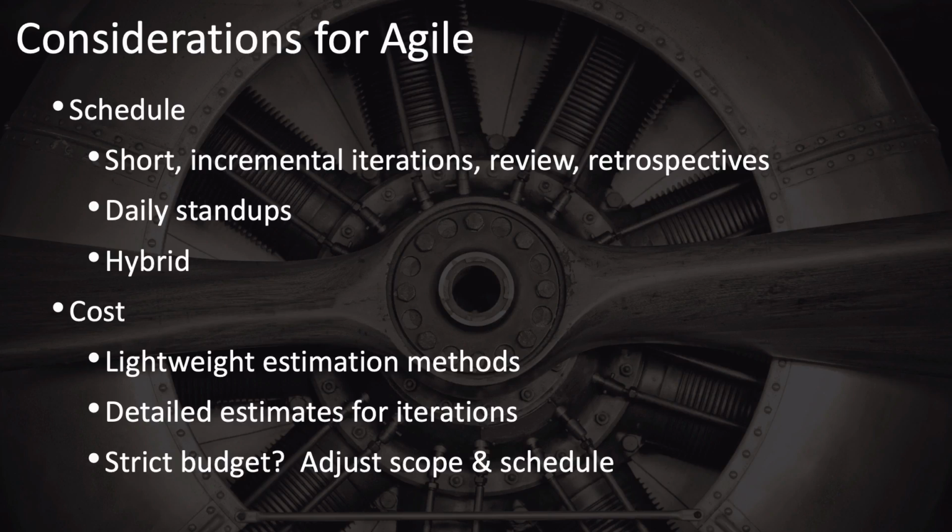Cost considerations are that Agile approaches generally use more lightweight estimation methods and leave the detailed estimates for the iterations themselves, and that if you're on a strict budget, you can use an Agile approach and adjust your scope and schedule to meet your budget as you go.